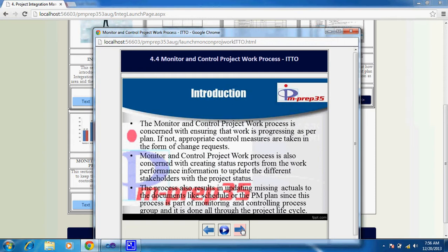So and so is the estimate that I have for the cost planned for this particular project, and that gets approved. So you keep tracking that cost using that baseline number, and if tomorrow there is any change wherein this baseline can be breached, or there can be an increase or decrease in the cost, then first of all the new cost baseline has to be updated in the relevant area. So the project management plan has all the baselines and also the links to other subsidiary plans.